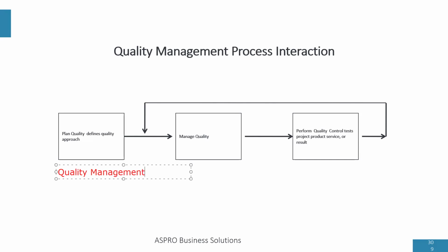Within the quality management plan, we have the quality objectives that we want to achieve, right? Maybe quality objectives could be the defect rate, or how many products can be defective, maybe less than 2% should be defective, if at all we are going to have any defects.